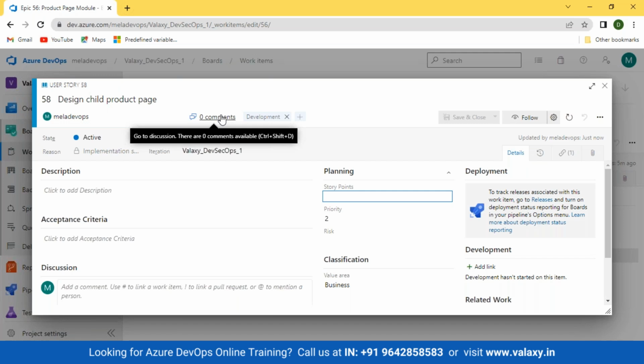Now suppose you said I can do this in 3 days. So the Scrum Master will go and put 3 over here for you. So this is 3 story points. The jargon is we talk about story points, we don't talk about number of days in a Scrum or Agile call. We say, okay, I'll take 3 story points, 2 story points, or sometimes the Scrum Master himself will assign some story points to you, and you need to go and negotiate, agree, disagree. That is something you can discuss along with your Scrum Master.